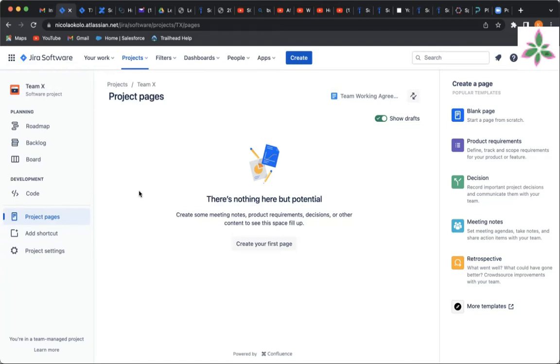As we all know, we do this at the same time, same place, every working day, and it's usually a 15-minute time frame meeting. Why we do this meeting really is to help the team with collaboration and to know the progress everyone is making, and also to bring to our attention any impediments that any of us might be facing. Everyone will have a goal of informing the team of what they did yesterday, what they want to be working on today, and any blockers preventing them from continuing their job.